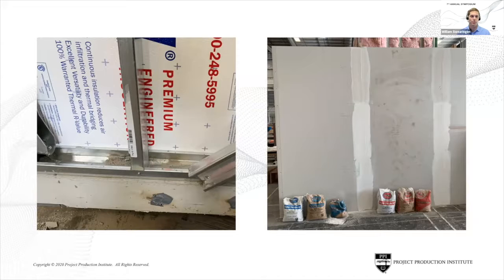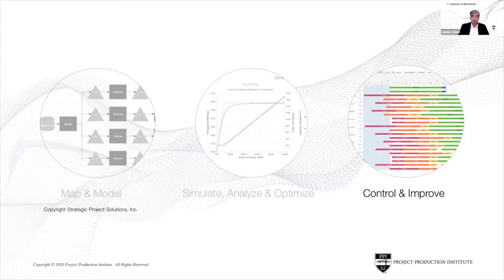Okay. Thank you. So as you can see, a lot of different factors are coming into play to optimize the overall production system so that it's minimizing the amount of cash tied up in the system. The production system is being designed to minimize the amount of cash tied up in the system, by minimizing work in process and ensuring the right capacity is allocated to the right place. So the next step, as we talked about, is to ensure that the production system behaves the way we want it to behave, okay?